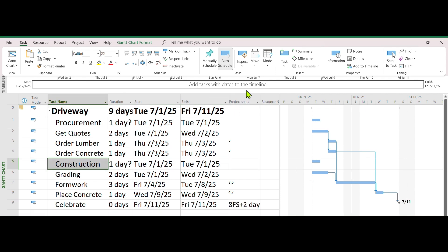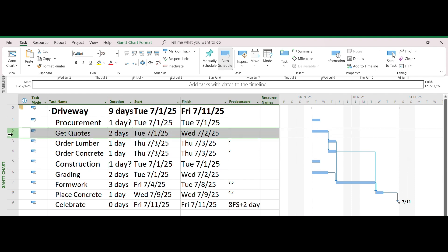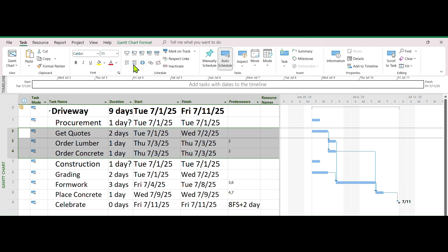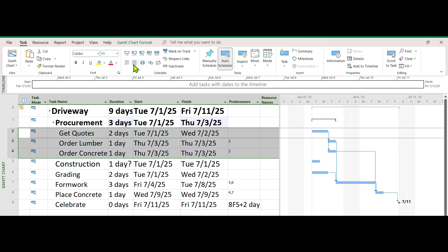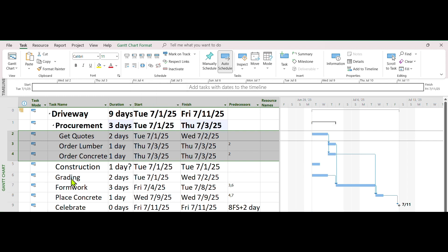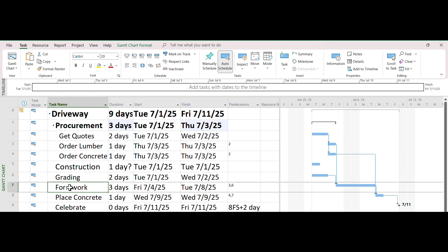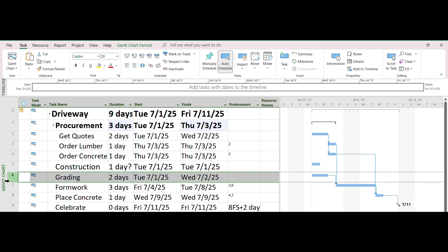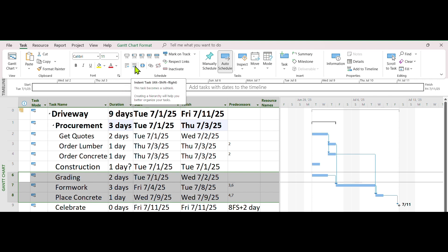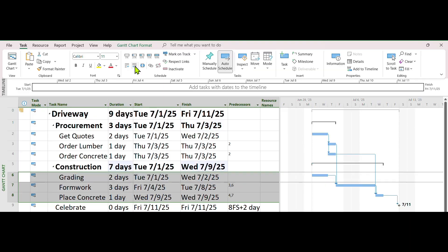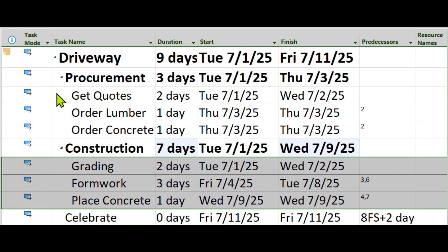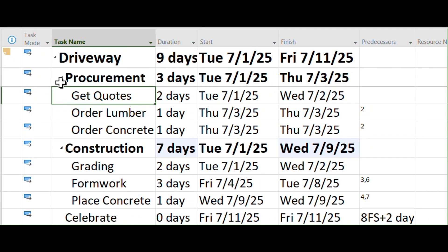Finally we are going to organize the tasks by phases. Select all 3 tasks below Procurement, including Get Quotes, Order Lumber, and Order Concrete. On the toolbar above, click on Indent button. Do the same with 3 other tasks below Construction, including Grading, Formwork, and Place Concrete. On the toolbar above, also click on Indent button. Now your finished screen should look like this. You can play with Procurement and Construction to expand or collapse phases.